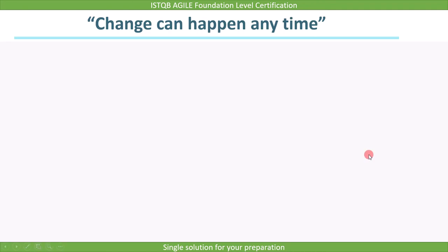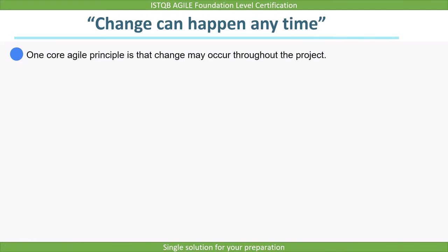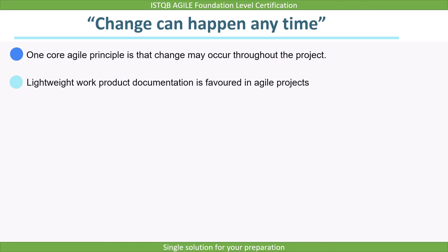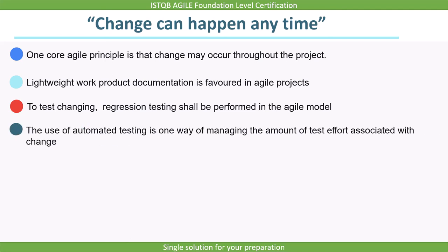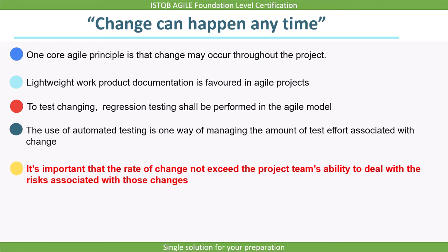An important point for testers in an Agile model is that change can happen at any time. One core Agile principle is that change may occur throughout the project. Therefore, lightweight work product documentation is favoured in Agile projects. To test for changes, regression testing shall be performed. The use of automated testing is one way of managing the test effort associated with change. However, it is important that the rate of change not exceed the project team's ability to deal with the risks associated with those changes.